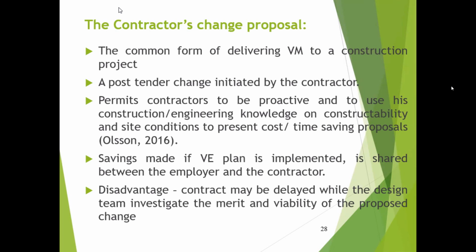The contractor needs to find out the merits and the viability of the proposed change, so they need a little bit of time. It is felt this would result in the project duration being extended, as they need additional time until they find the viability of the proposed project.